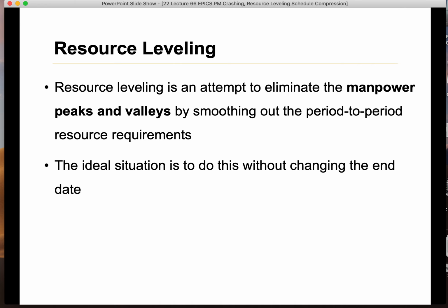maybe some machinery, or some clean labs, or classrooms, meeting rooms, right? All of these things, or trucks. So you want to level these resources so you can use them effectively. When you're doing resource leveling, it's not desired to make the project run longer.